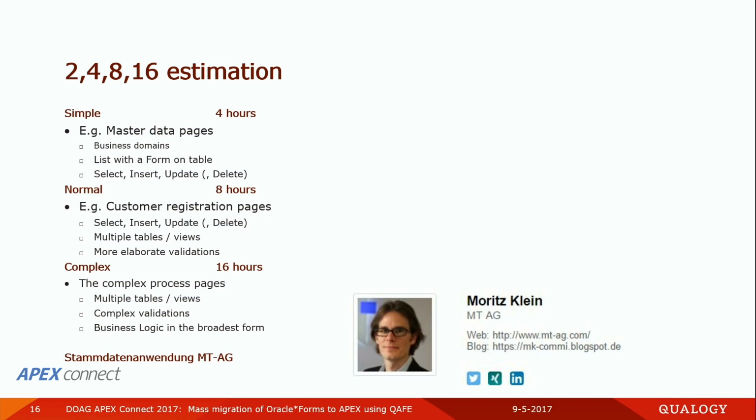So the generator is crap, but it saved us so much time just typing in the stuff. Eventually we had changed every page that was made by the standard application, but it saved us a lot of time. So using those kinds of tools, I am able to say that I can bring simple forms down from 4 hours to 2 or 3 hours in several cases.